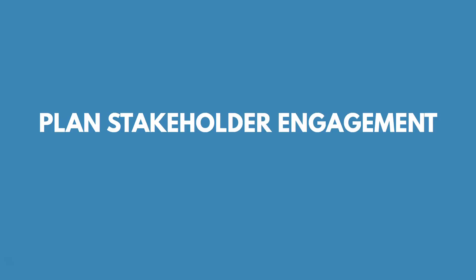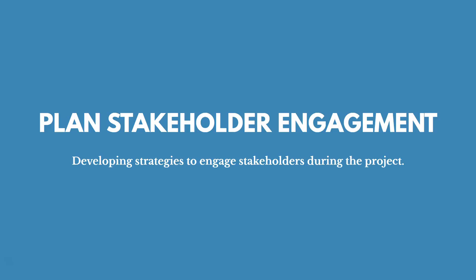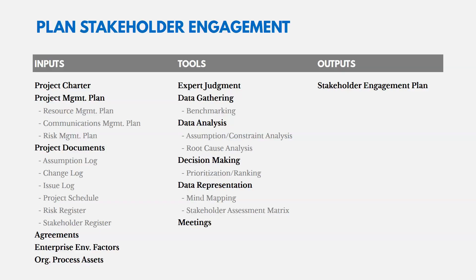Plan stakeholder engagement means developing strategies to engage with our stakeholders during the project, because stakeholders could have a significant impact — either positively or negatively. Like all plan processes, you're going to see the project management plan as an input, and the individual plan — in this case the stakeholder engagement plan — as an output.